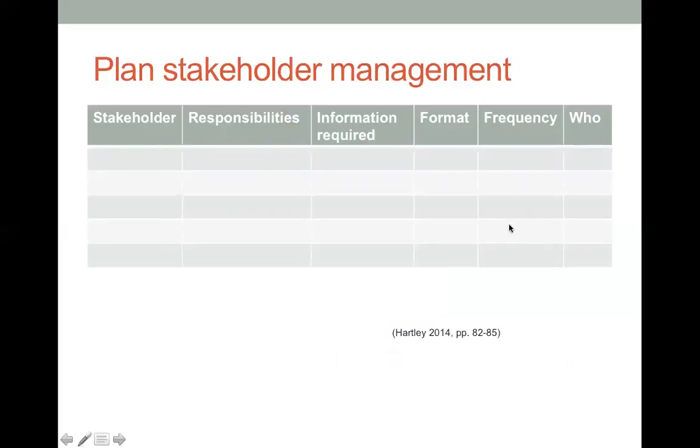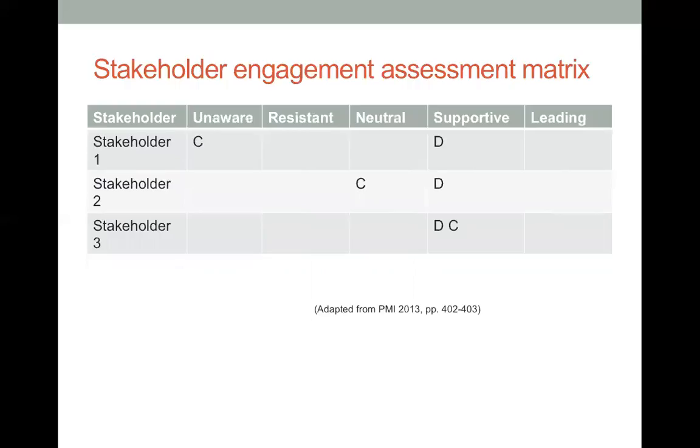So there you go. The stakeholders can also be analyzed in this area here: who the stakeholders are, what they are responsible for, the information that they need, the format of the information, how frequently we need to update them. So that's another format to help us manage our stakeholders. This is another tool for us to consider in terms of managing the engagement of our